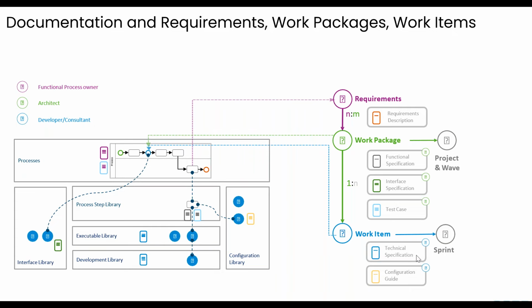If there is any configuration in addition to that, we would also create a work item to deliver that configuration as well. The goal would be to have dependencies between these 2 items. If they are assigned to the same sprint or to different sprints, we would be able to deliver one in sprint 1 and the second in sprint 2, in order to fully test that and do a show and tell before we mark that sprint complete.